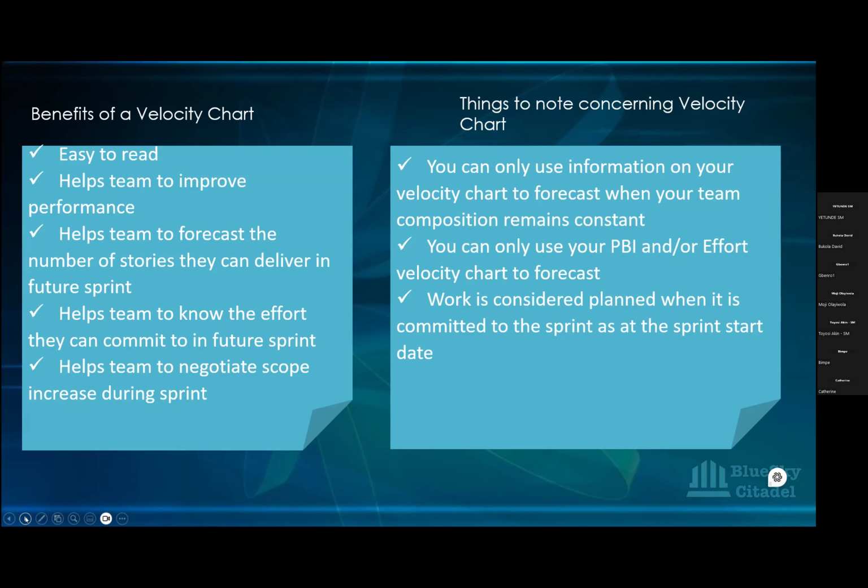You're not going to look at the chart and say, oh, but it says 90. So that means we're going to commit to 90 story points. You can't deliver 90 story points with half capacity. You have to reduce it. The chart is not going to tell you your next sprint is going to be 48. You are the one as a Scrum Master, and if your team understands, but mainly by you, because you're the one that has calculated your team's capacity.